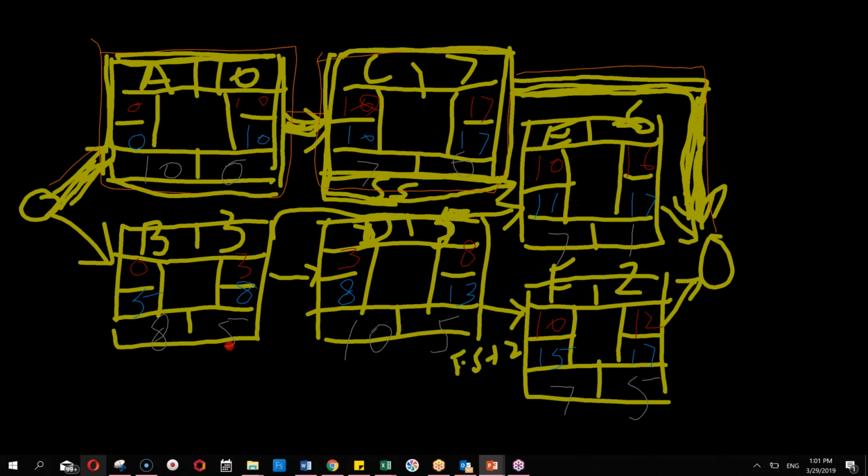So I have got all the data. I have also discovered the critical path. Is it possible to have more than one critical path in a project? I believe it would be, in case theoretically the other path has the same duration. Exactly, correct. The other path has to have the same duration to be critical. You can't say that the second nearest path is 16, so that is also critical, or near critical, or something like that. There is only one duration which is critical, and that is the highest duration. And if that highest duration is shared by 2 or 3 paths, they all will be critical, and all the activities on those paths will be critical.